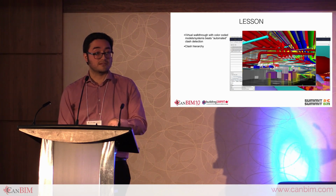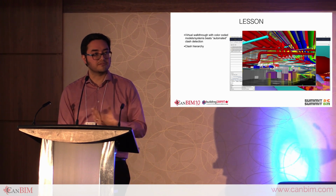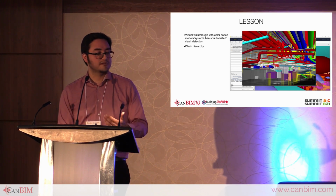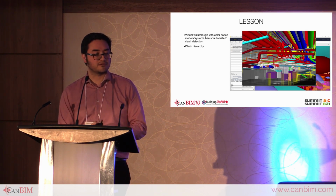There's also the idea that it's not all clash detection, right? It's all about having a process where you have a clash hierarchy, that you know that gravity systems are harder to move, and then that should be something that gets discussed and documented in your project execution plan earlier on.